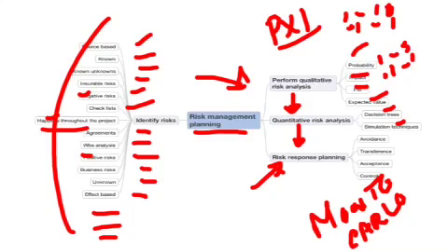So again, strategies for risk response planning would be risk avoidance. Something is risky, don't do it. That is risk avoidance. Maybe smoking is bad for health, don't smoke a cigarette. That is risk avoidance. Risk transference. Taking an insurance is a clean example for risk transference. Or outsourcing a piece of work which is really complex. That can be another example of risk transference. Risk acceptance, okay, I'm willing to take it, so that is risk acceptance. And risk control, you accept the risk and you try to control it through proper risk management, that is risk control.